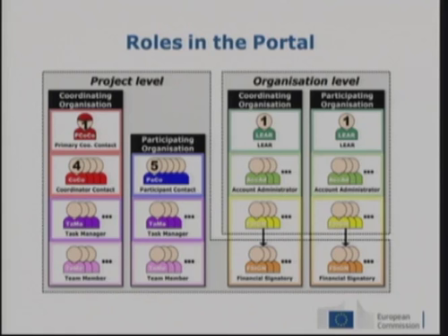It's done via sessions. The sessions always have the same workflow. So you open a session. I mean, the Commission opens a session, sorry, by a project officer. Then the coordinator plus the beneficiaries provide the requested information. Then the coordinator is the only person that can submit all this data collected from the coordinator and the beneficiaries.